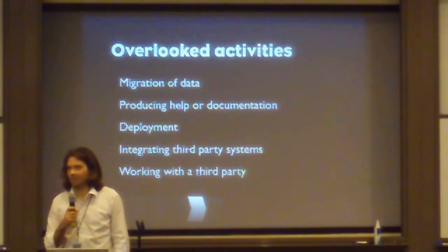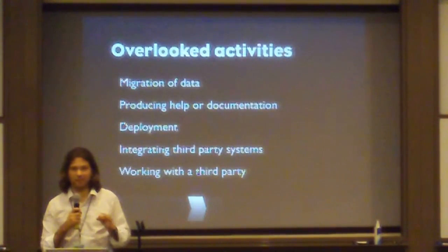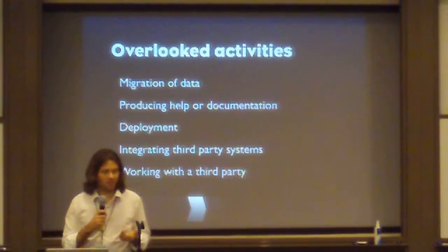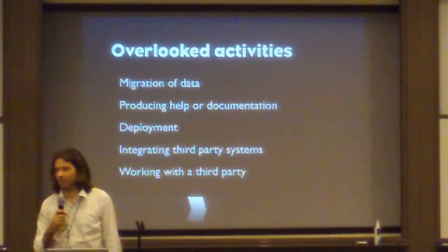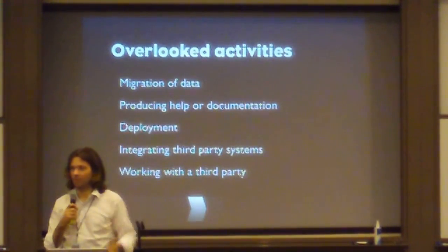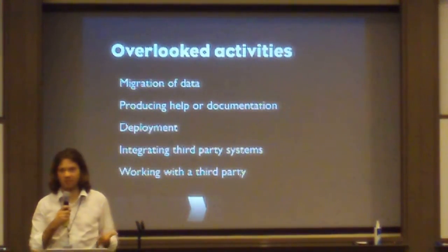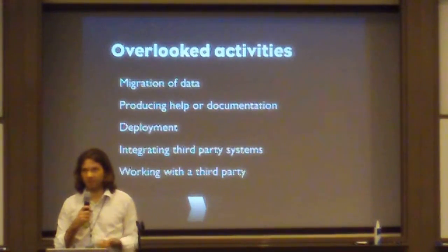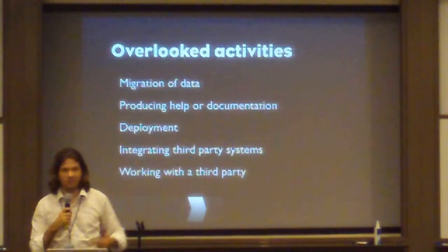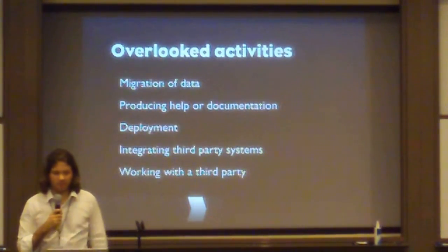Producing help and documentation. Almost every site needs some form of documentation. You will put it in code, you will write notes, you will write some sort of manual. This takes time, so take that into account. Deployment is often overlooked. You actually have to set up a server. You have to put things in a repository. You have to check it out. Maybe you're using Hudson or some kind of continuous integration solution. Same thing here. You have to set these things up, and it actually has to be put on a server and needs to run. You may need to do security updates. By the time you release, it will take time.